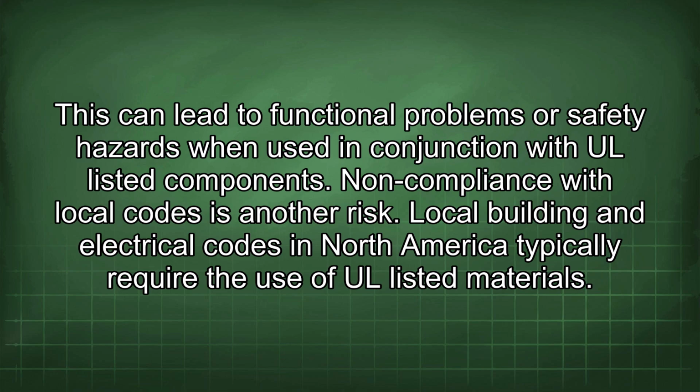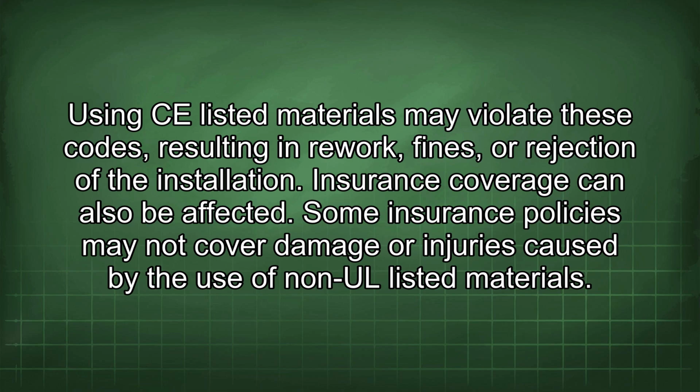Non-compliance with local codes is another risk. Local building and electrical codes in North America typically require the use of UL listed materials. Using CE listed materials may violate these codes, resulting in rework, fines, or rejection of the installation.